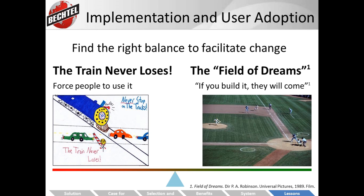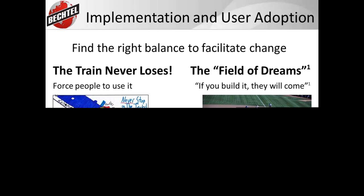And we really struggled from that standpoint because we're taking a bunch of non-swimmers and throwing them into the deep end and saying, why can't you swim? Whereas going the other way, you're starting everybody in the shallow end. Even if you've got some folks that are going to be what we call your earlier easy adopters that are going to want to run ahead, that's fine, let them do that, if you're, from a policy standpoint, okay with that. But you want to move everybody slowly through the use of the tool. And then make sure you're aligning your training with those phases.